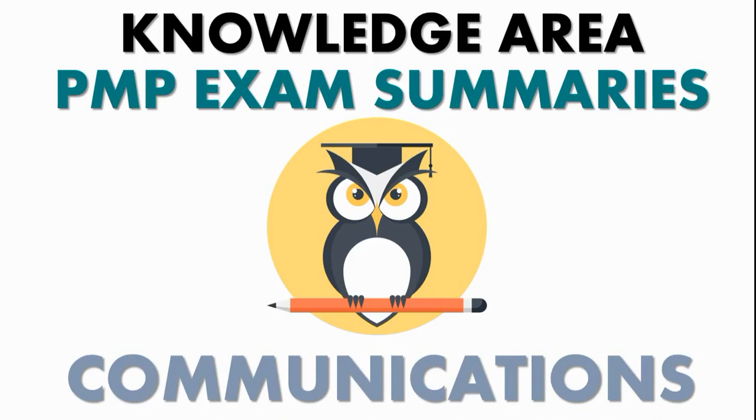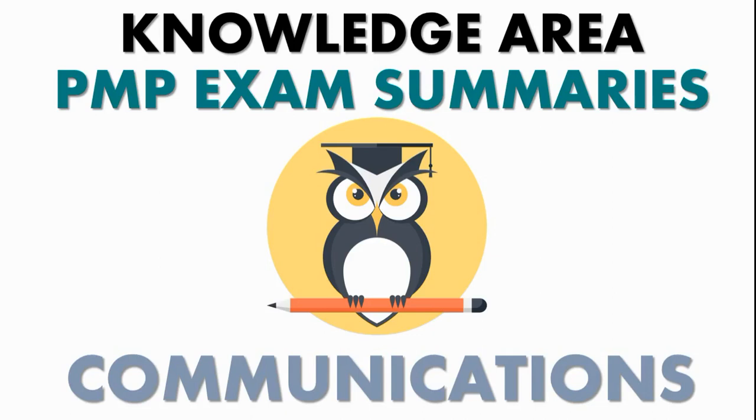It's estimated that the project manager spends 70-90% of the time communicating. On the PMP exam, you can expect a lot of questions that anchor communications to other areas, especially stakeholder management. Where there is a problem or concern with a stakeholder, the project manager needs to communicate.